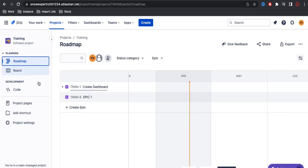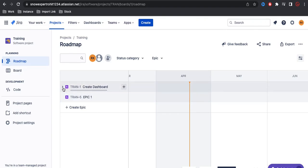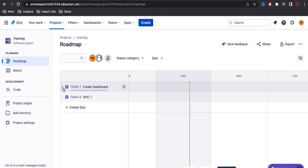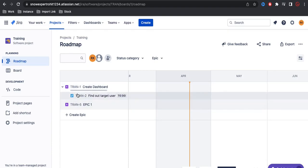Epics will be shown under the roadmap. Once you go to the roadmap you will be able to see these epics showing. Under the roadmap we can see how many epics are present for these projects. If you expand an epic, we have a clear understanding of how many stories or tasks are under that epic. An epic is a high-level design — for example, 'create a dashboard' — and it may have four or ten small tasks shown under it.